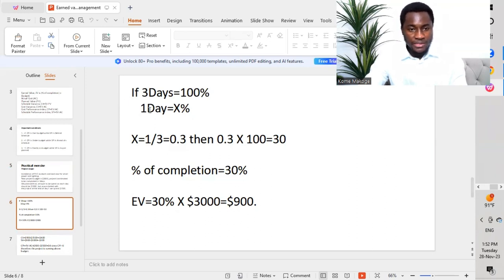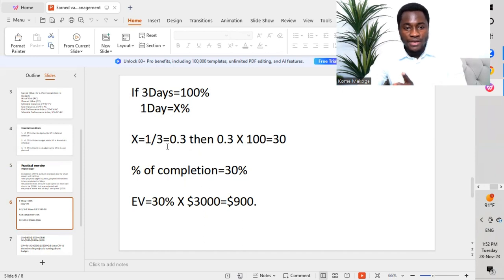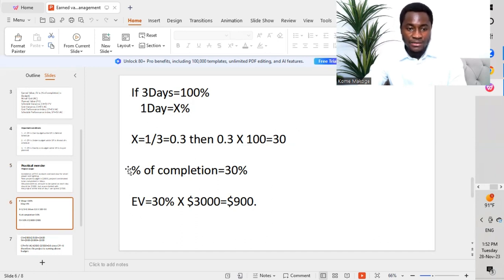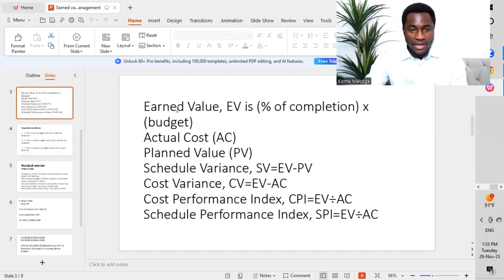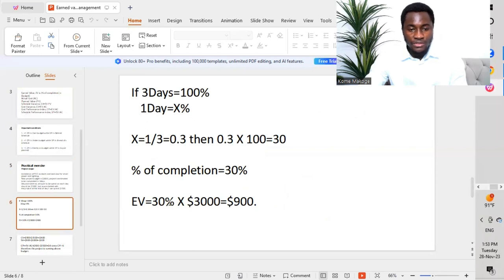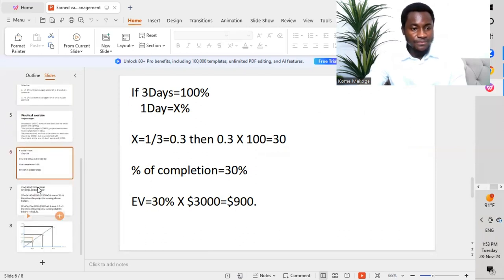If 3 days equals 100%, then 1 day equals x percent. So x equals 1 divided by 3, which equals 0.33, multiplied by 100, which equals 30. So we have a total of 30% completed at the end of day one. Earned Value (EV) equals percentage of completion multiplied by the total budget: 30% multiplied by $3,000 equals $900 US dollars — that is our Earned Value.